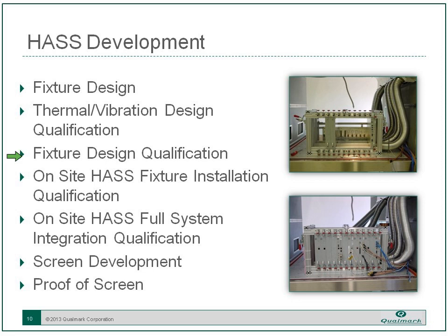If the fixture is designed here at Qualmark, we'll repeat that on site so that we can do what we call the installation qualification, and then a full integration qualification where we're making sure that things like ATE that is linked to the Qualmark control system is functioning properly, and we look at the human interaction and the ergonomics of the system and making sure that everything is coming together as expected.